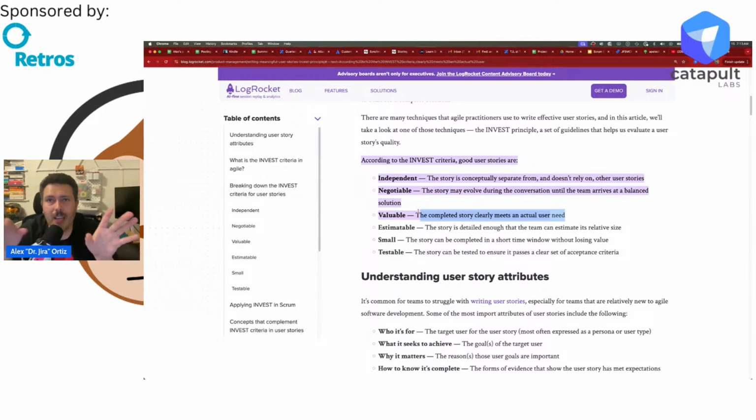And so in Jira, we're going to get into this, right? In Jira, we actually have two different types of issue types or work types, right? We have a story and we have a task. And we can kind of determine whether we create a story or a task based on our definition of value. And that's usually how I evangelize stories versus tasks. Is one providing you value, the business, or is one providing value to the team only?